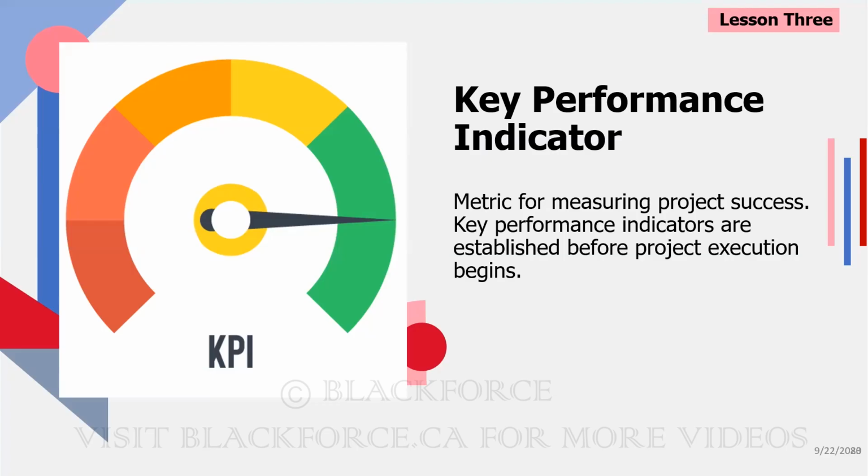So in the context of a project, we will identify what the KPI is before we begin the project so that as we make progress, we're checking it against our KPI to say, are we where we said we would be? If one of the KPIs is that this project is going to last for 1 year, and we've agreed that at the end of every quarter we will have built 25% of the solution, then at the end of that quarter, we're going to look at the entire list of requirements to check, did we actually build 25%?